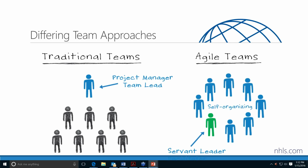and they create the project plan. They create the management plans, how we're going to do it, the documentation. They work together to create the scope, the cost, and the time baselines. And then the project manager creates the project management plan that everybody follows, the Gantt chart, the bar chart of how all of the activities are tied together. That becomes the rule by which we work.